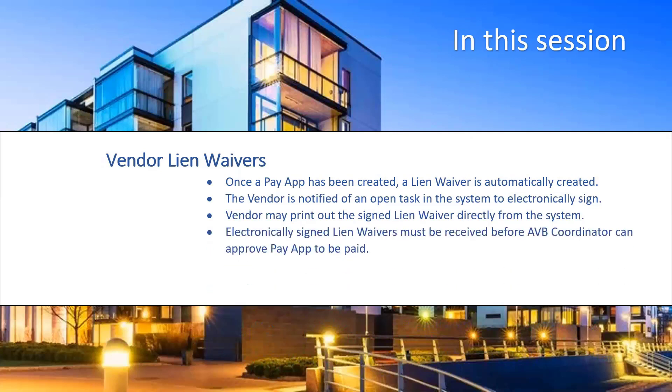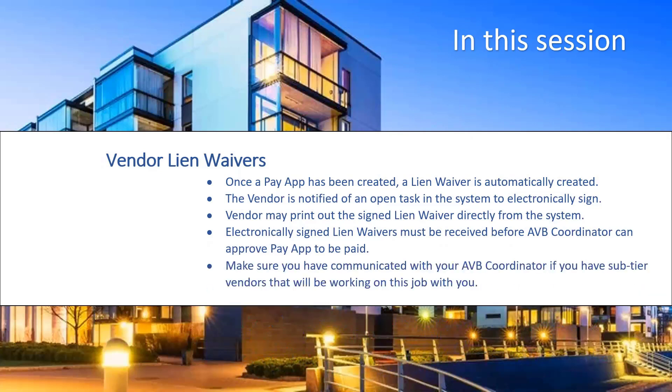Electronically signed lien waivers must be received before the Avalon Bay coordinator can approve the pay up to be paid. And as a reminder, if you are using sub tier vendors on this project and you have not yet notified your Avalon Bay coordinator, please do so now.